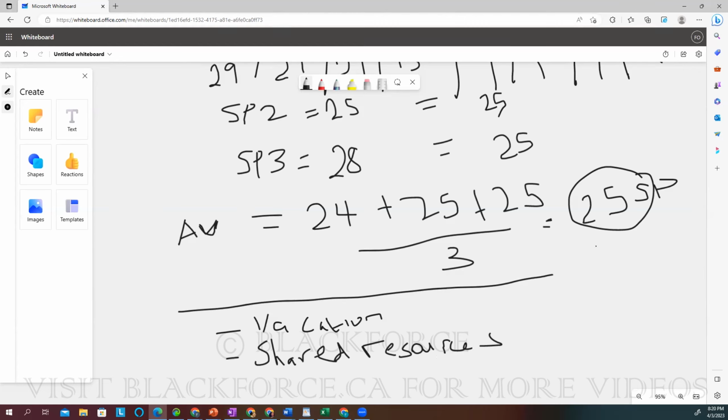So in that scenario, because your team normally does 25, maybe the work the security person is going to be working on will be another, let's say, 5 story points. So in that sprint, your velocity will be 30 story points. In a situation where there is vacation, maybe 2 people are not going to be around for some days.